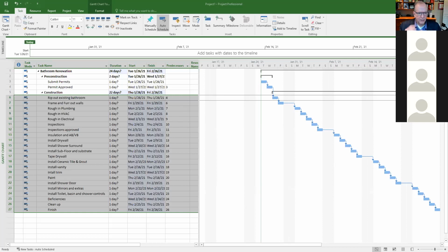the last custom house I built was in 2001. It was about a 7,000 square foot house. And the bathroom was like a master bedroom. The bathroom was huge, right? In that case, I could get away with scheduling plumbing, electrical, even HVAC in some ways in the same bathroom because it was big, right? So I could have stuff going on at the same time.